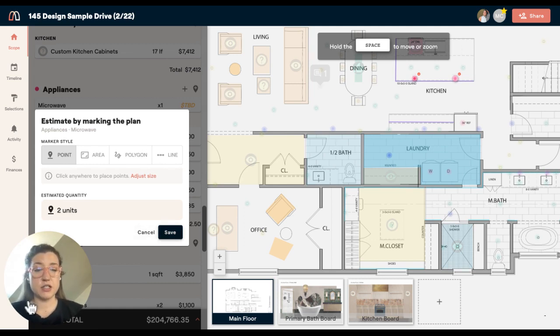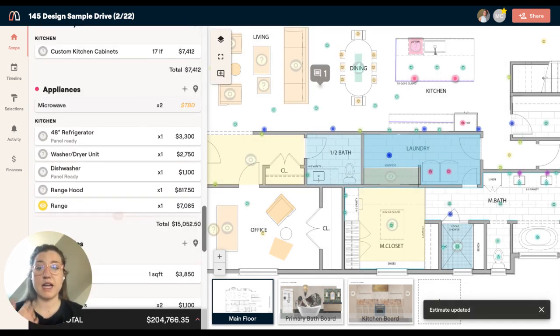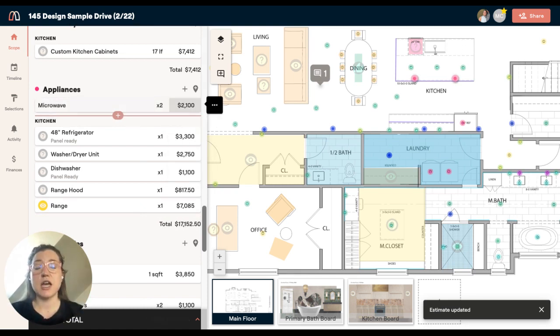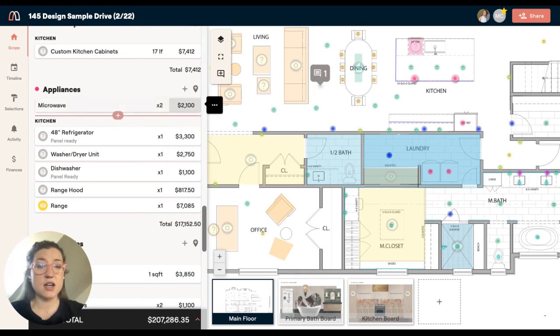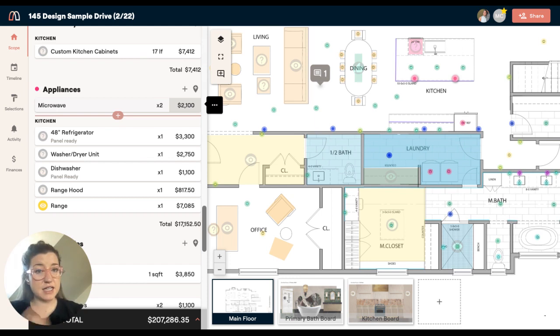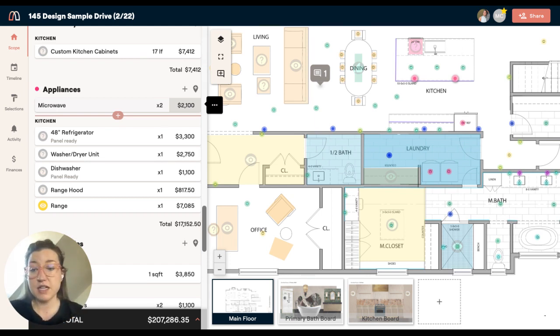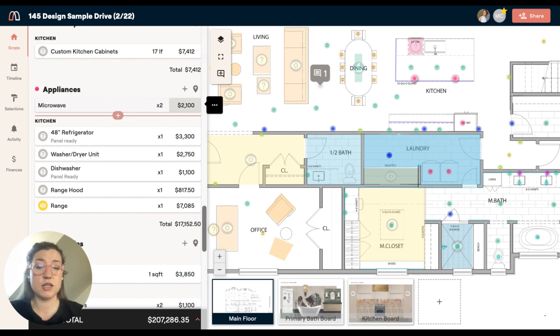It's going to say I've got two units. And then when I add it and put in the price, we're going to estimate these at $750 each, it's going to automatically take that quantity and do the math for me, which makes estimating really quick. That's one way that you can estimate with markers in Materio.